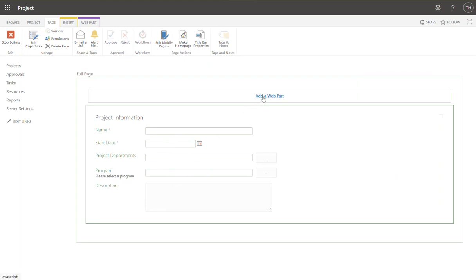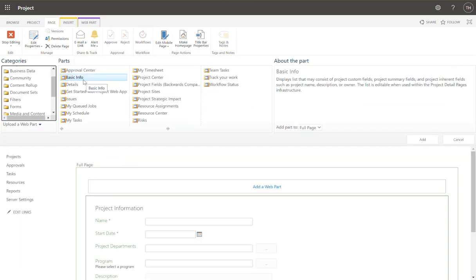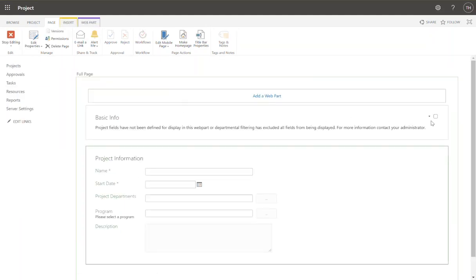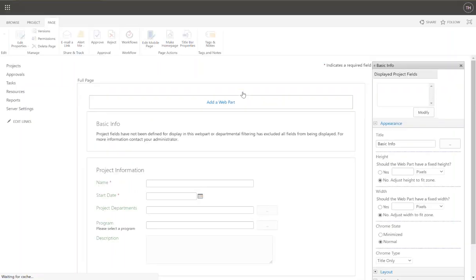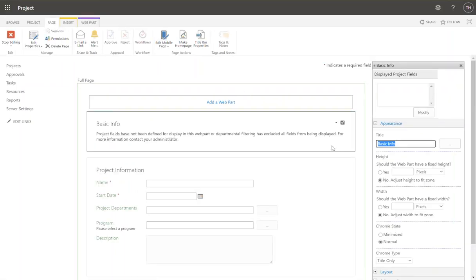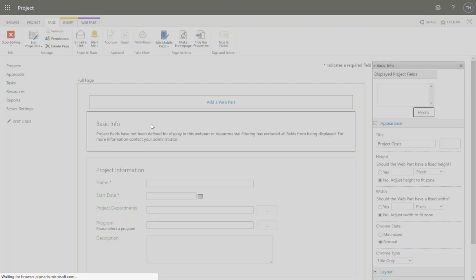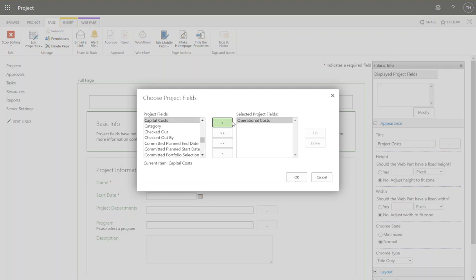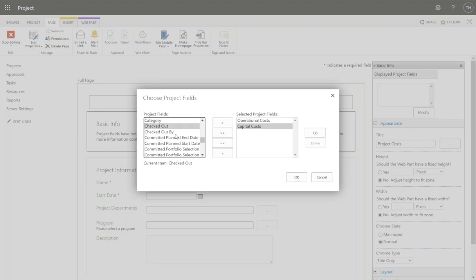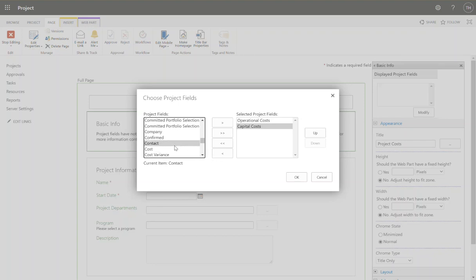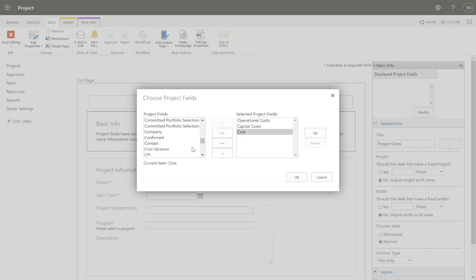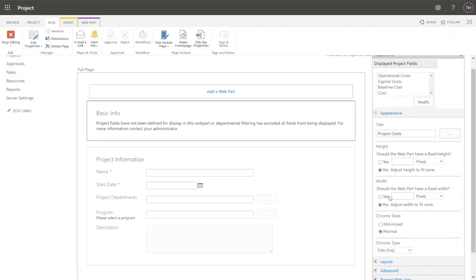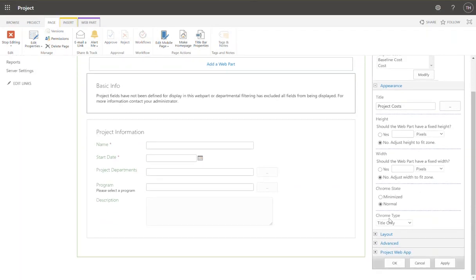I'm going to add a second web part. Basic information. Add. Modify. Edit web part. And then you come in here and call this costs. Project costs. And in here I'm going to have my operational costs and capital costs. You also have total cost. Or I think it's just cost, which is the out of the box field, which is the scheduled cost coming from the project schedule. How much do we forecast this project cost? There's all kinds of other costs information here that you can have. I'm setting those three basic, two of them custom, one of them out of the box. You even have baseline cost. That's always a nice one. Let's add that too. Put that just above there. And we'll give it a title. Project costs. You want title only. Press OK.